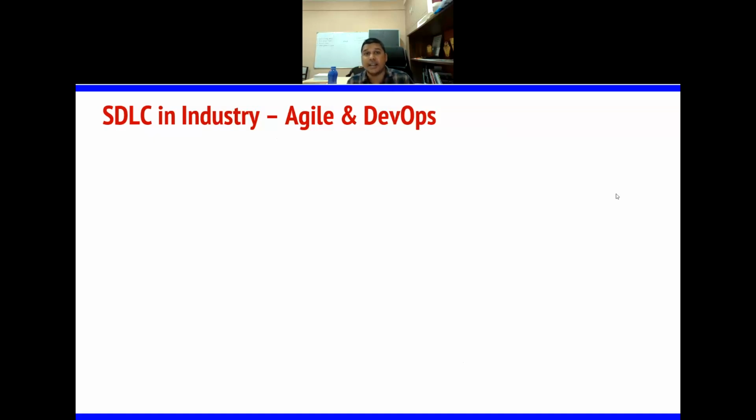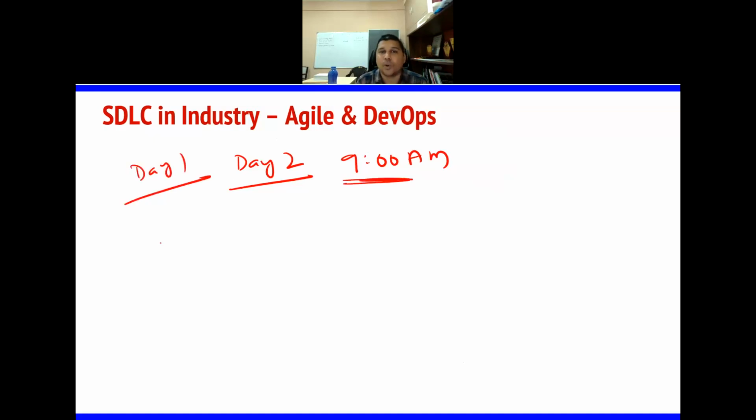Morning is to know what you have done yesterday. Suppose, I know some people working in different industries. So let's assume day two is the first call. At 9 a.m. we had a stand up call. In this stand up call at 9 a.m., you have to tell what you have done on day one, the progress, and what challenges you faced. And you also have to commit. For example, you will say 30% is completed on day one. You have to give a commitment. How are you going to resolve these challenges?